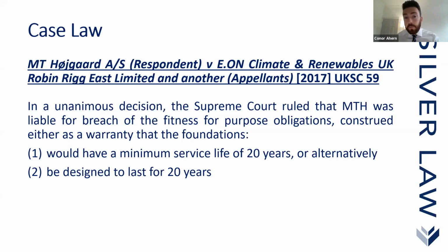But really, you'd want to be reducing the standard down to a position that's in line with your professional indemnity insurance. If you have a gap, say if the contractor takes on a fitness for purpose obligation, but it only has insurance for reasonable skill and care, that's going to be a balance sheet risk for the contractor, because he's not going to have a policy of insurance to call upon in the event that there's an error in his design.